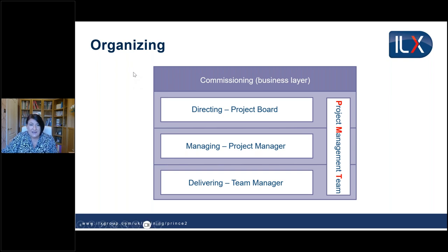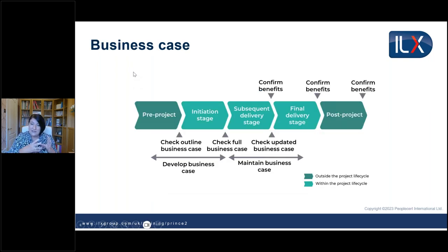Now, as well as the organising practice, we also had a look in starting up a project at the business case practice, because we create the outline business case. As we progress through our project, as we move into the initiation stage, we will then update that into a full detailed business case, which needs to justify the delivery of the project. But as we move forward in the project and we come towards the end of each stage, we will then update the business case to see if we've still got that continued business justification.